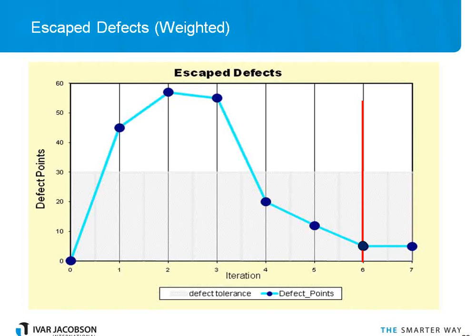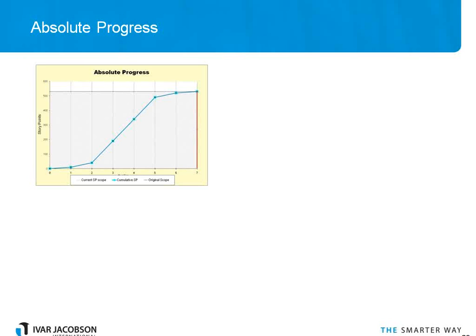It's only a problem if the defects are still in the build at the end of the iteration, which typically we'd like to be production quality, i.e. free of defects. So we've got the weighting, we have our target, our tolerance, and you can see here that we achieve production quality in this case by the 4th iteration. If we can stay within that tolerance the whole time, then that's to be obviously encouraged. But we can see this and compare and contrast against other projects.